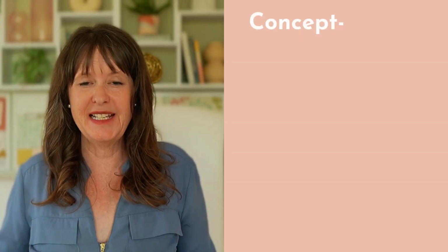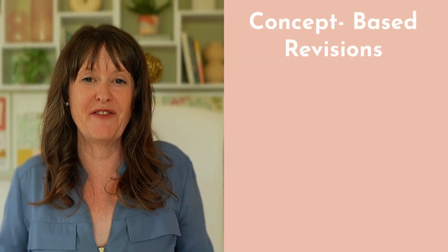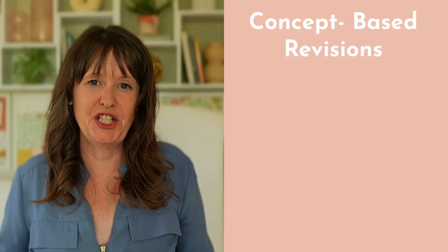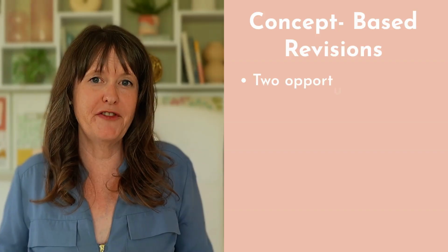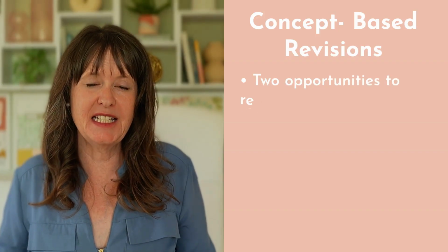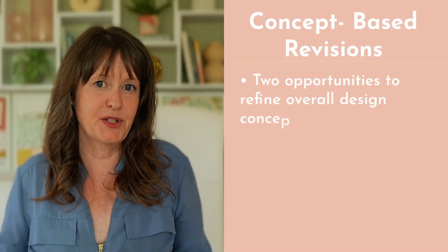Alright, now another option is to do it by concept-based revisions, and this is probably my personal favourite because what it does is it actually captures changes to the project right at the start. So you specify that your 2 revisions means 2 opportunities to refine the overall design concept before any detailed sourcing or specification begins.